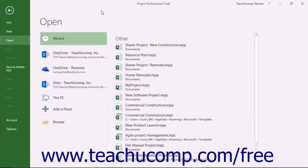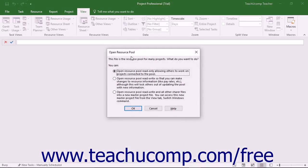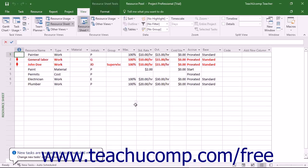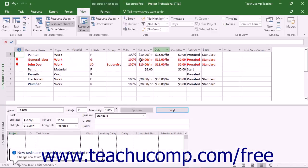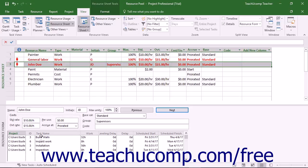Once you have a shared resource pool linked to sharer plans, you can open the resource pool to examine the resource allocations within the resource sheet view. If you split the pane, you can see resource allocations amongst multiple projects for any selected resources.